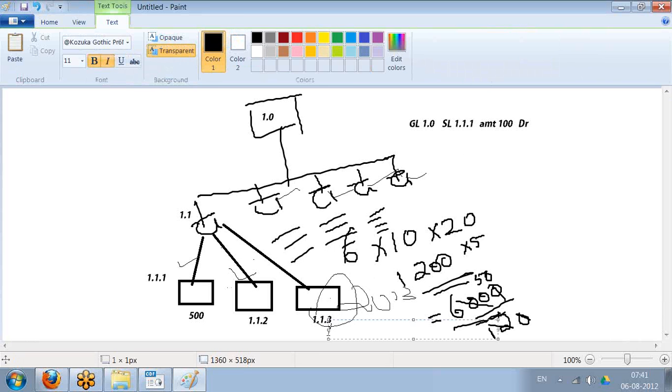And the piece of work which is done through a control account is known as a planning component. It can be a work package, a group of work packages, or just a part of a work package. That piece of work operated through a provisional account or a control account is known as a planning component or a planning package, and the budget for that is the provisional account or the control account. You may get 1 or 2 questions on this.